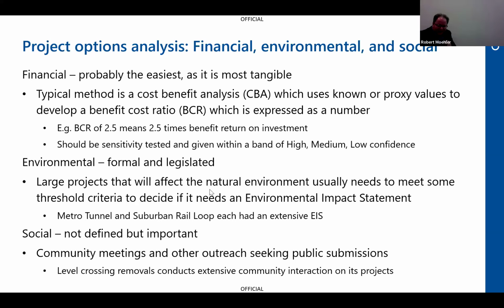Yep. We have your slide, and you were talking about South Kensington. Yeah, that's right. At South Kensington, the decline structure that runs from the existing rail line into the tunnel enters a flood zone. If you go down there, you'll see they've had to put quite a large wall in along that entryway. And recently there was a big flood, and that flood has made them rethink whether the original EIS was sufficient.